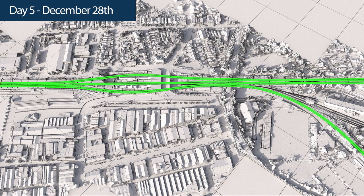This will include handing back any associated electrical high voltage and 1500 volt permits and setting up appropriate delineation to protect our workers when the Illawarra mains reopen. SMU will then commence removal of worksite protection, and complete booking in the new infrastructure and setting up appropriate signalling bridging authorities for the concurrent possession.